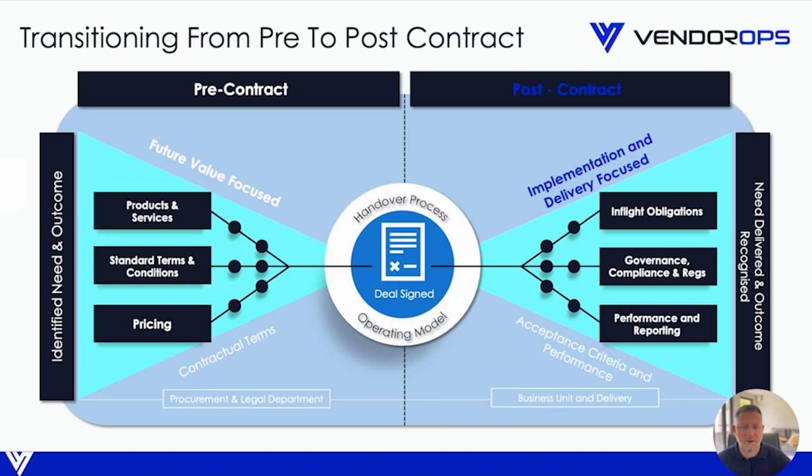So what can you expect to have as pitfalls throughout this process? Well, initially on the left-hand side of the bow tie, the pre-contract teams start ramping down. They start getting to the point where the contract's about to be signed, and a lot of that manpower disappears and focuses on the next deal or the next thing they're meant to be working on. Typically, this causes a flow of data that reduces, and the format that it's constructed in now is typically, like I said, that document that isn't in a format that's designed for post-contract management.